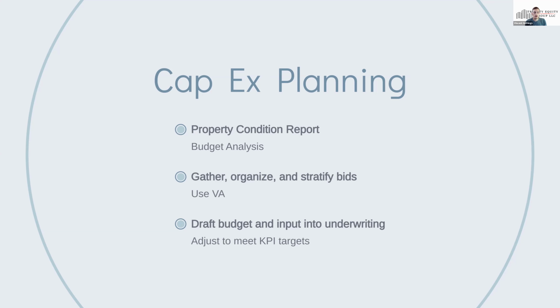You can't have the PCR in one day, and then 3 weeks later have the electrician come, and a week later have the plumber come. It doesn't work like that. They want everything done on that day or very close to it. They don't want to keep disturbing the residents in that community. So to be proactive, and again, this goes into planning, you're going to schedule your PCR, get that date, and then schedule as many subs as possible for that same exact date.